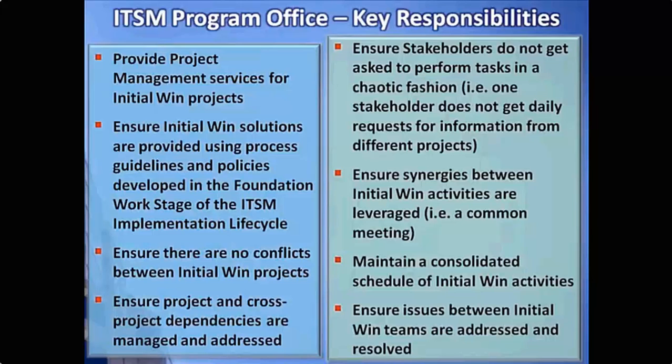Making sure that synergies between your initial win activities are leveraged. So if there's a common meeting that can serve several purposes, then using that as an approach. Maintaining a consolidated schedule of initial win activities. So they've got the master schedule, if you will, of all the activities across all the projects that are going on. And then also ensuring that issues between initial win teams are addressed and resolved.